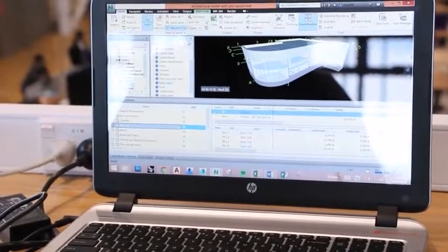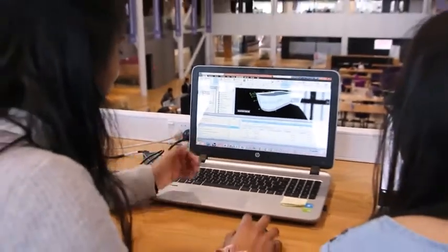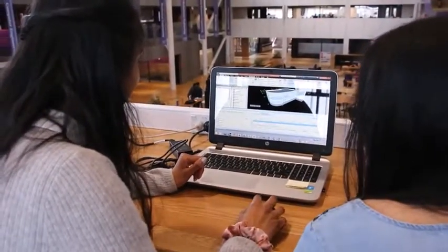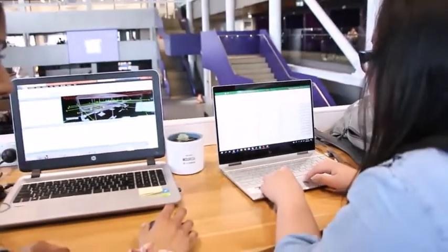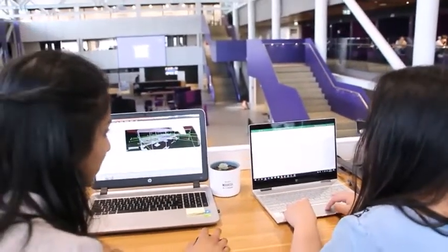Navisworks contains many tools so that no objects will be missed or counted multiple times during the quantity takeoff. The built-in CSI 16 catalog was used to group objects based on appropriate groups in the industry standard. It was incredibly straightforward to perform the quantity takeoff, and an Excel report was generated after that.